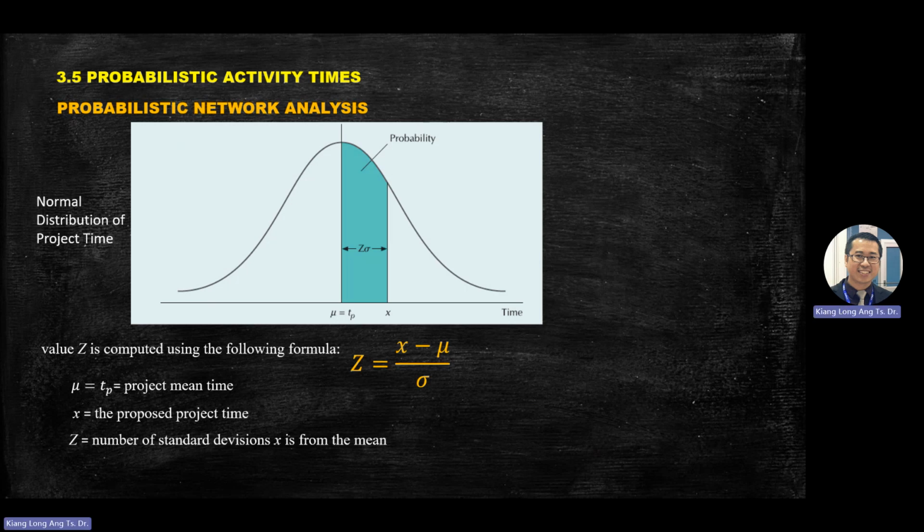Just now it was variance, but this one you use the standard deviation value, so don't use the squared value here. I've seen students make careless mistakes here. In the previous section you calculate the square, then you get one value, you throw that number here, then it's wrong. You won't get the correct answer.